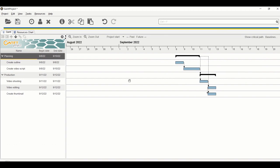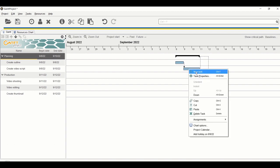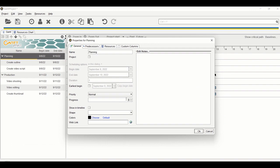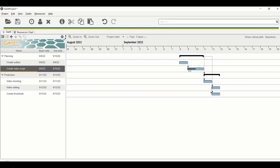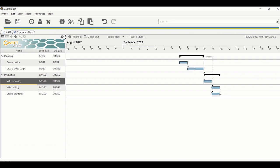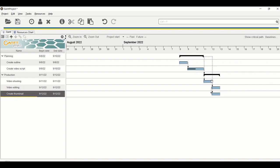Now let's learn how to add a completion percentage to tasks. For example, if I'm halfway done creating my video script and want it reflected in the chart, there are two ways. One is to right-click on the task, go to Task Properties, go to Progress, and type the percentage — for example, 50 — then click OK. You'll see a black line indicating progress.